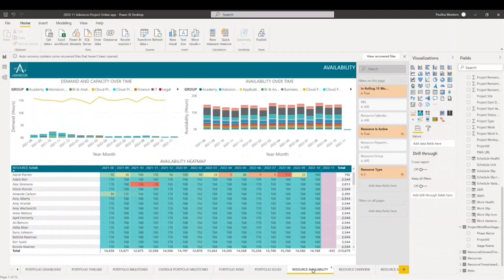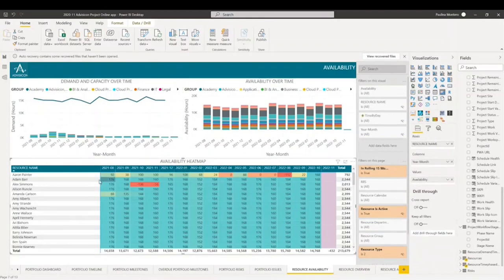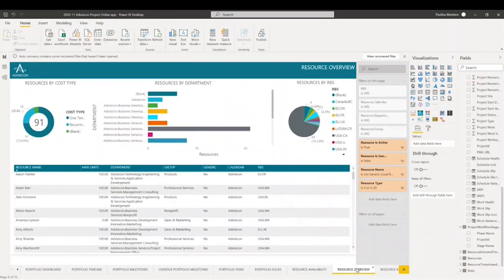Next up, we have resource availability. The resource availability report allows resource managers to quickly and easily determine which resources are over-allocated and need to have their workload reduced, as well as resources that have the capacity to take on additional work. So we have our demand and capacity over time graph, availability over time, and our availability heat map as well by resource. Then we have our resource overview — this is an overview of the resources by department, by cost, for management to get an insight into what the resource pool looks like and their data. They are associated by groups, department, and RBS, even by cost type.